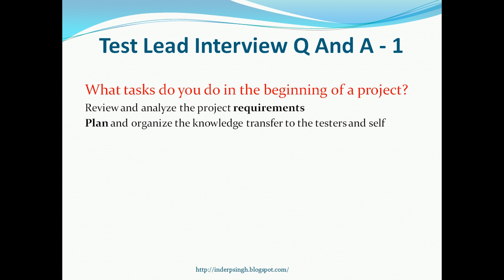Sometimes the testing team has to work on a very new project for maybe a new customer or in a new industry, or where the development team is totally new. So it is important for the team to be familiar with the system that they are going to be testing, whether it is the existing version of the system or it is the system corresponding to a particular industry. So the team should get very familiar with that. So the test lead should plan the knowledge transfer and make sure it is done.